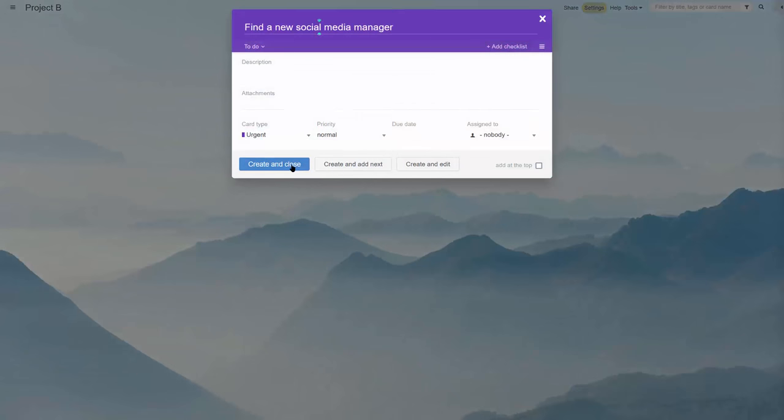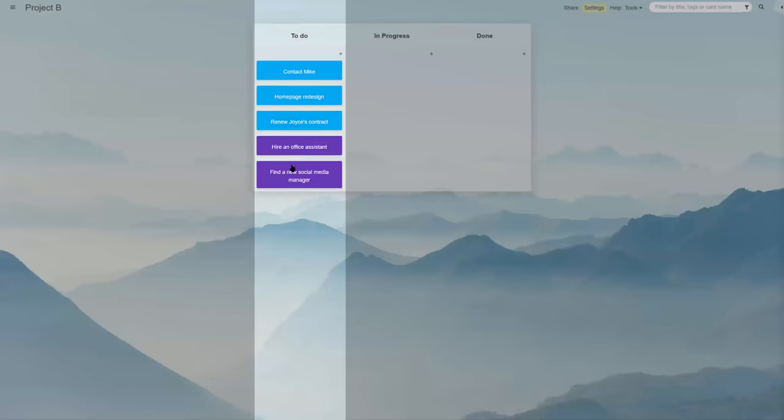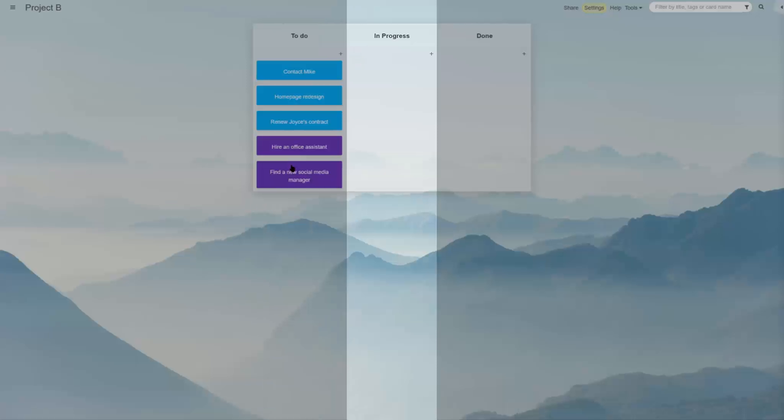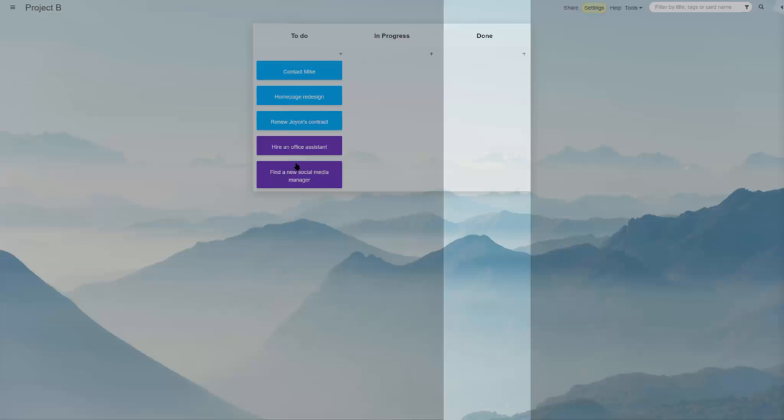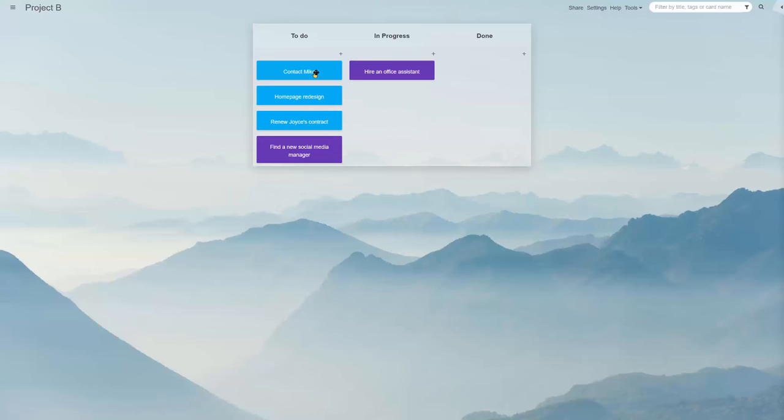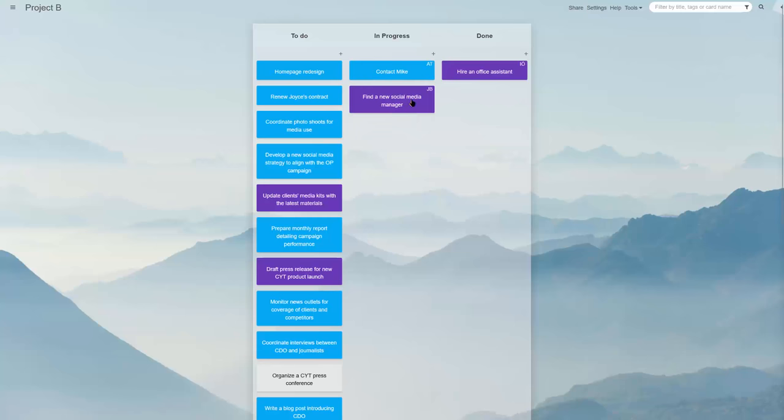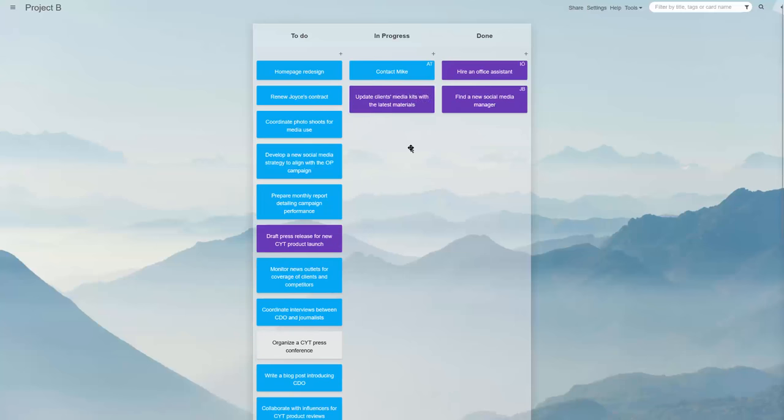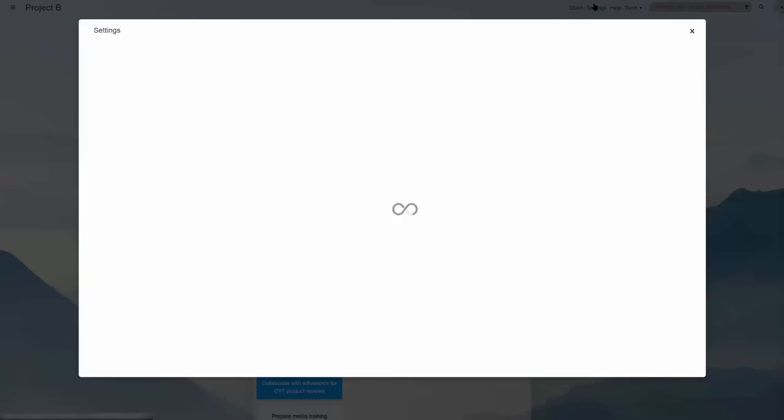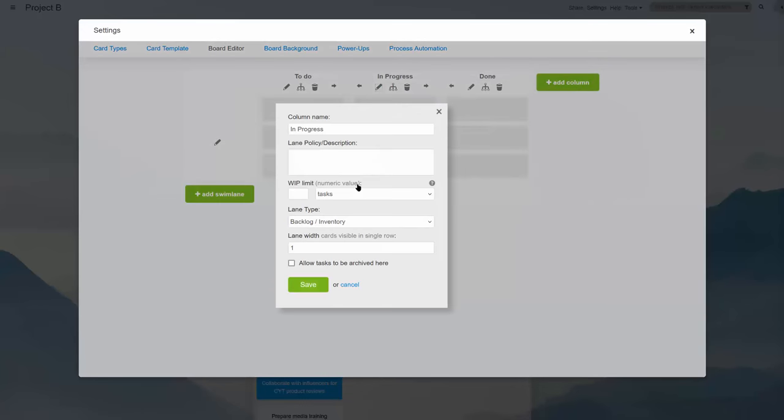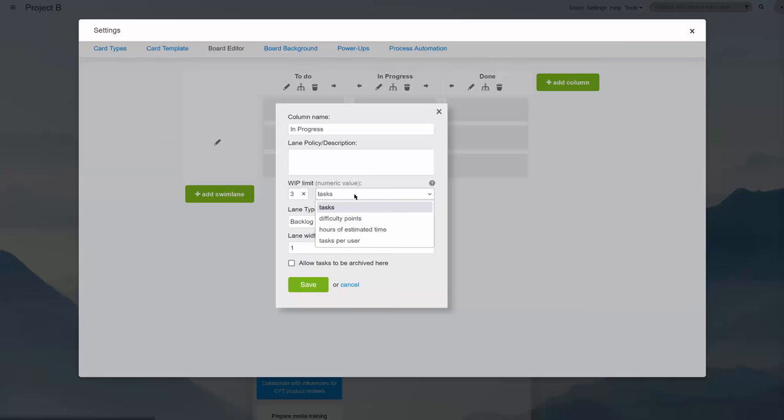The Kanban workflow management method is based on visualizing your process steps as columns, with task cards for every work item moving across them as work progresses. A particular element of Kanban is limiting the number of tasks in progress to increase focus and completion rates.